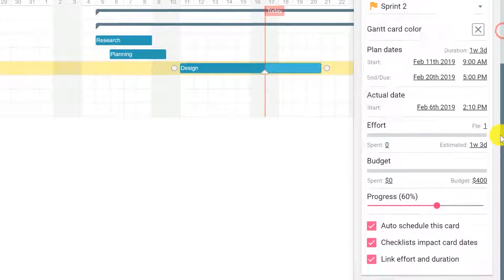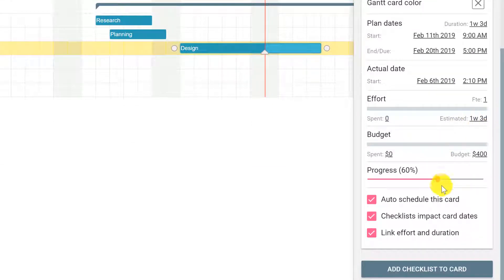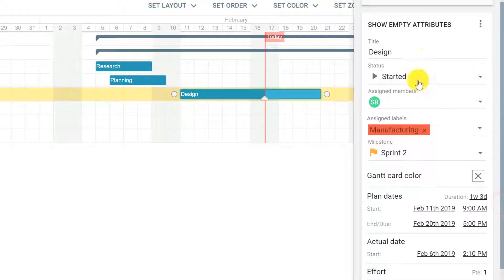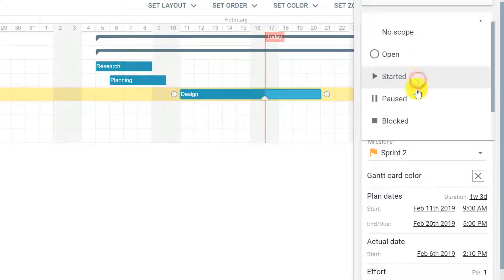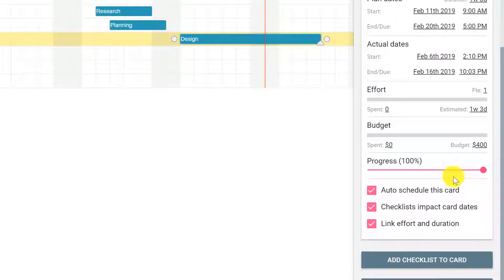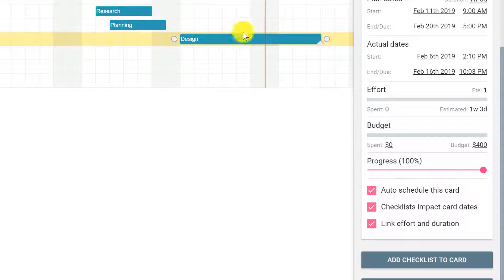If you scroll down the panel, you will see that the progress is set to 60%. Now if the status is changed from started to completed, the progress will become 100% and the color of the task will become a darker blue.